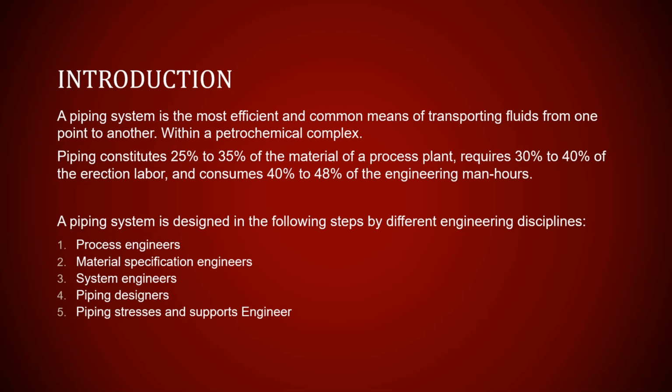After that, it comes the role of the piping designers to start routing the piping in the model and start building the model. After completion of 30% of the model routing, piping stress engineers start to review the model and start to proceed in their studies. And all the duration of the project, the coordination between the piping engineer and the piping stress analysis engineer continues to reach the optimum design of the piping system.